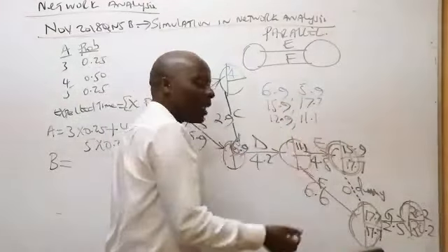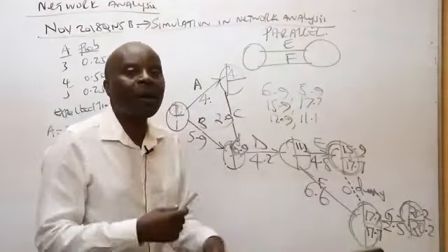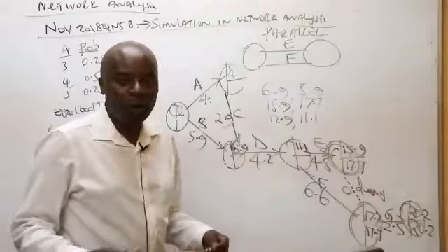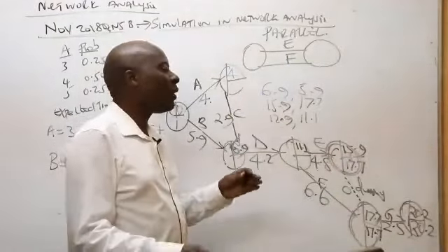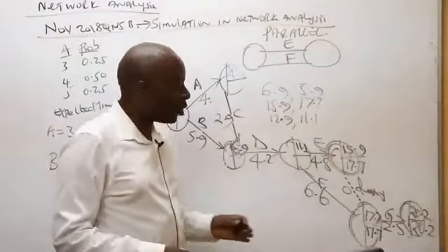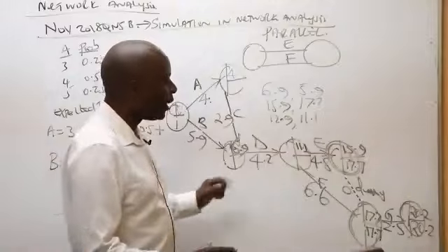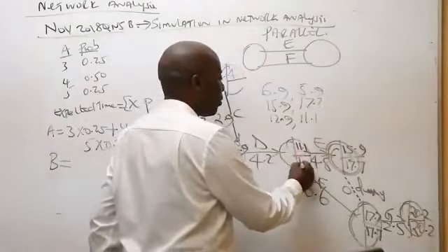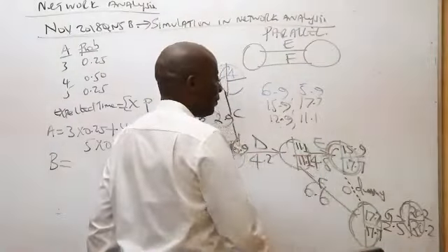11.1. And I am telling you, as for backward pass, for those of us who love football, we know that a backward pass is a small, gentle ball. Backward pass, when you return the ball to the goalkeeper, you play it softly. So backward pass, you always work with the smaller. So the smaller here which will prevail is 11.1.